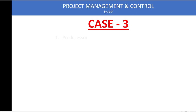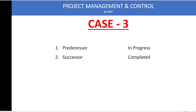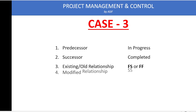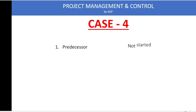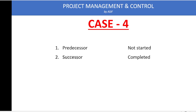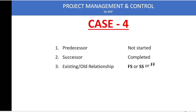The third case is that the predecessor is in progress and the successor is completed, linked with Finish-to-Start or Finish-to-Finish — this link needs to be modified to Start-to-Start. The fourth and final case is that the predecessor has not started and the successor is completed, so the successor does not need the predecessor. Regardless of what link they are connected by, it should be removed.